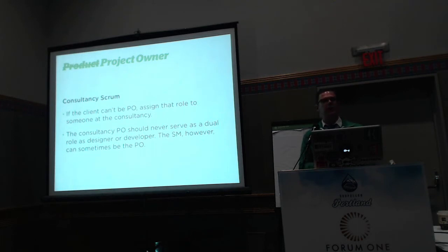But that person cannot also be a designer or developer in the project. So assign a project owner, but don't make it one of the designers or developers, because now you have somebody who is being pulled in two directions. They are having to make tough calls about the project. They have to understand the project vision, and then they're being asked to execute that project and work alongside everybody who they've just asked to work overtime. So make sure that these aren't the same people. They will get burnt out. Designers and developers should be designers and developers.